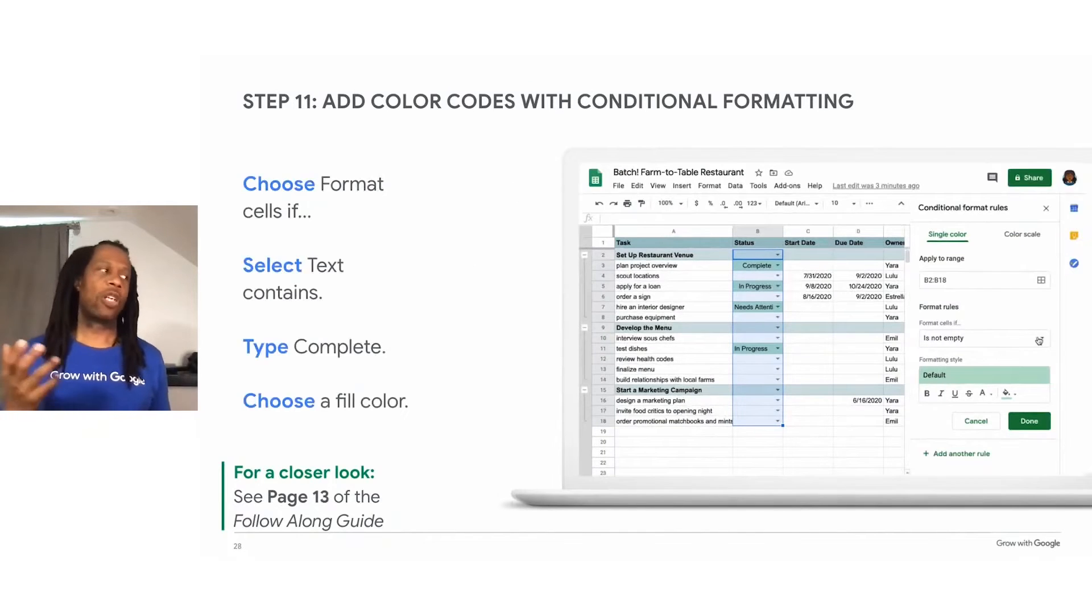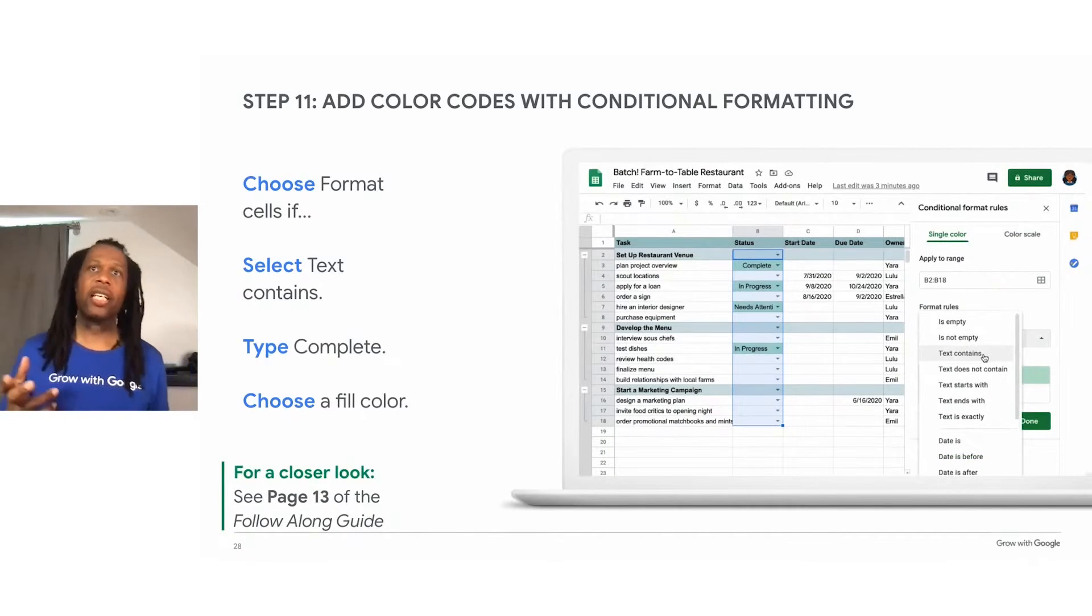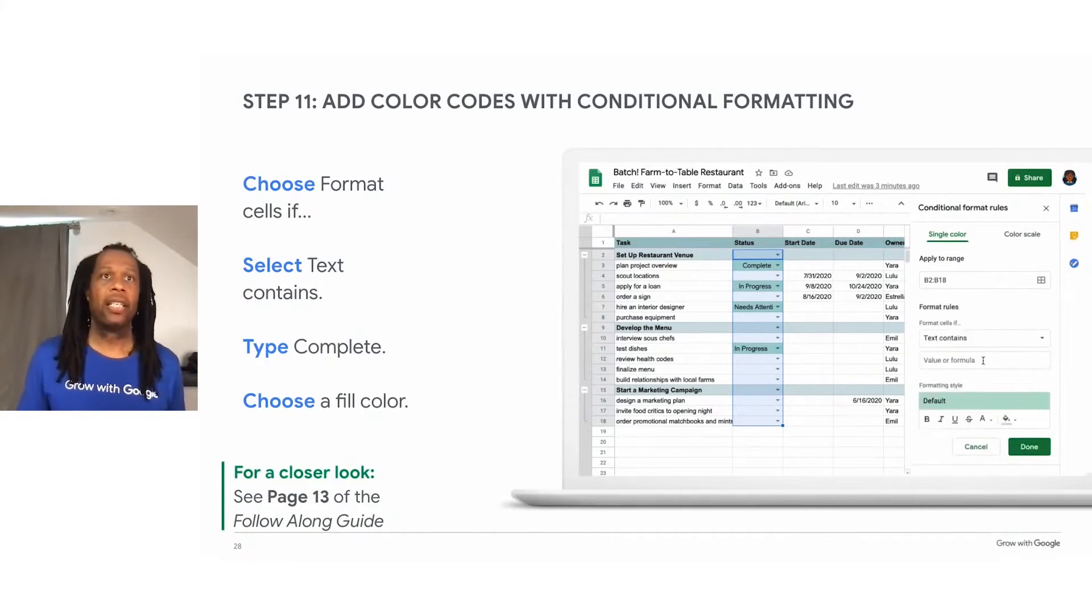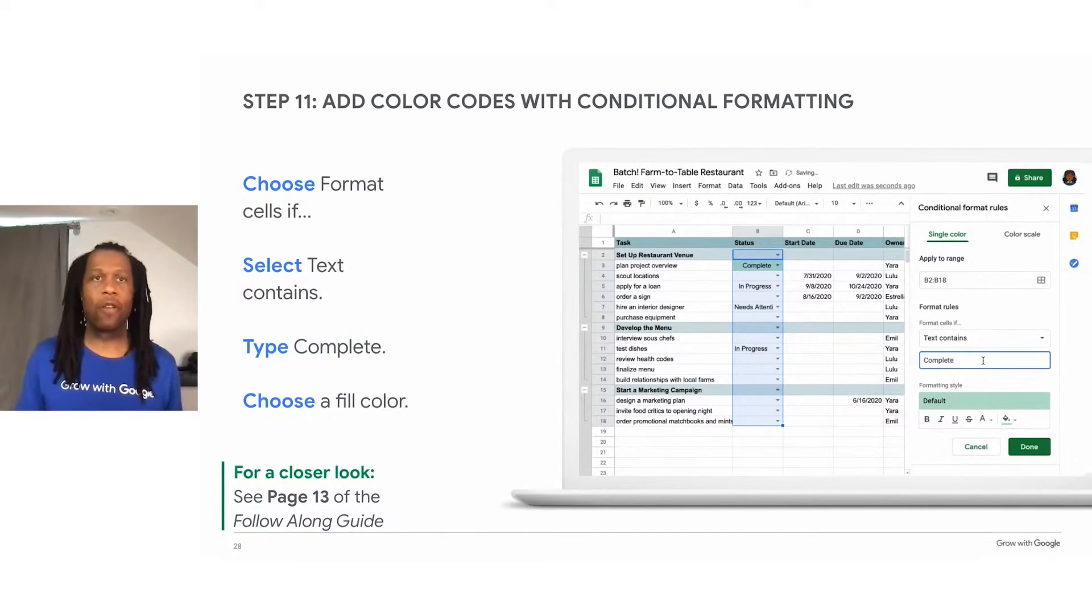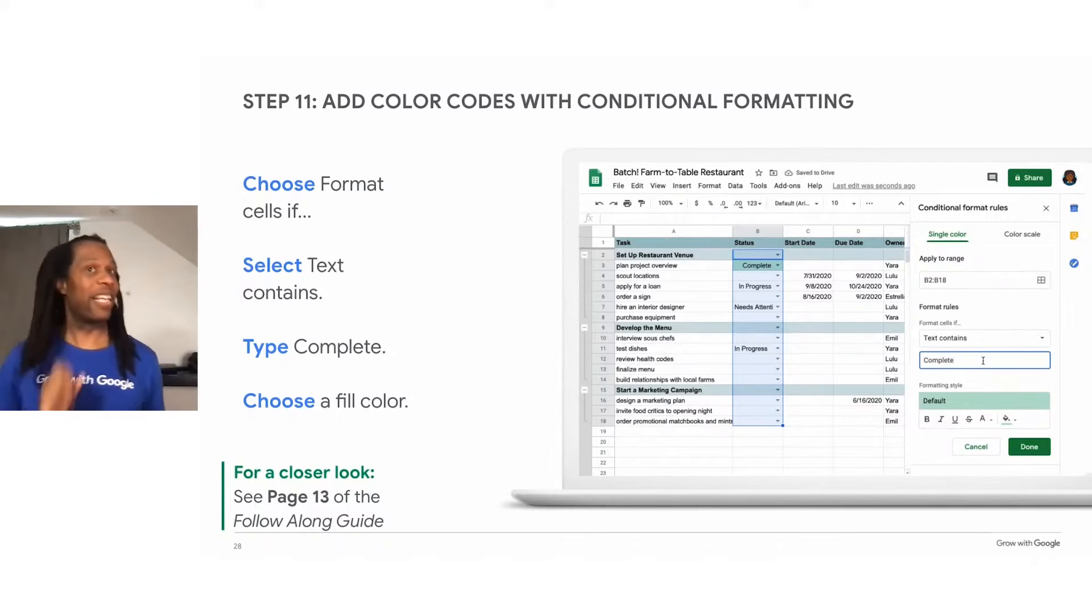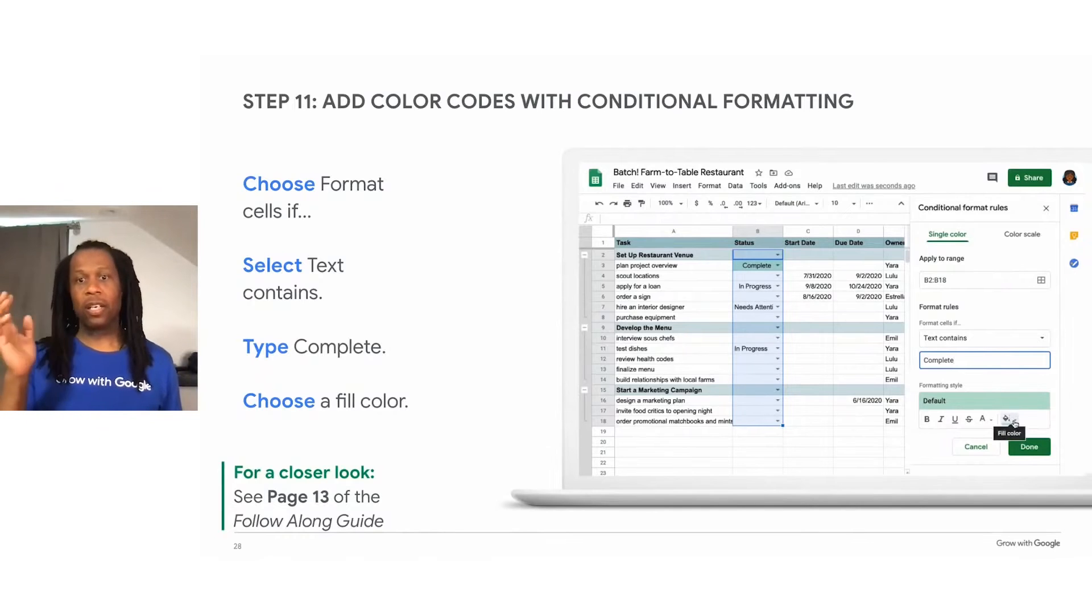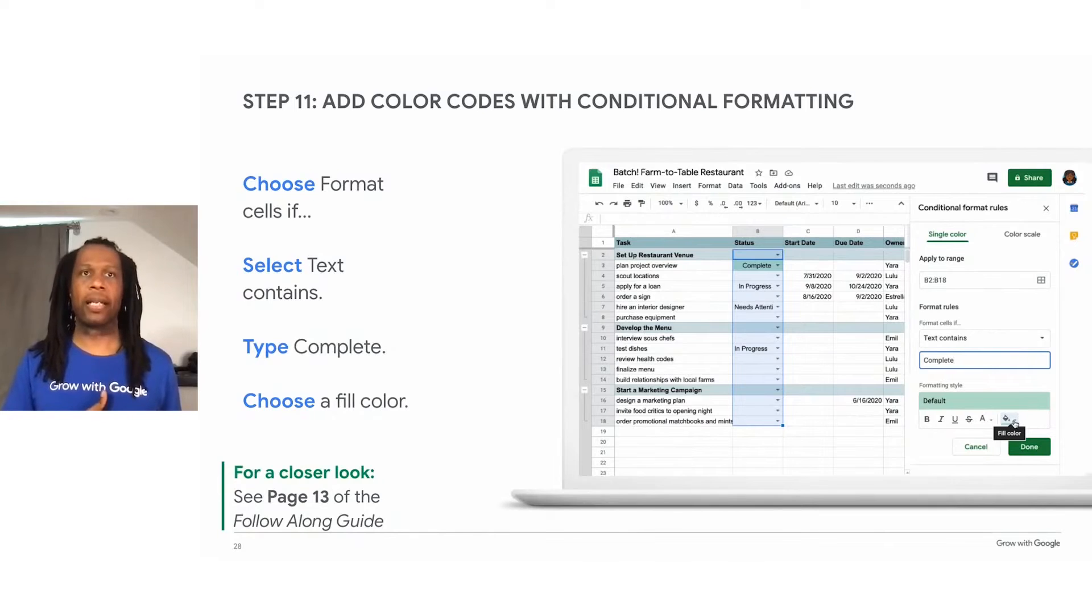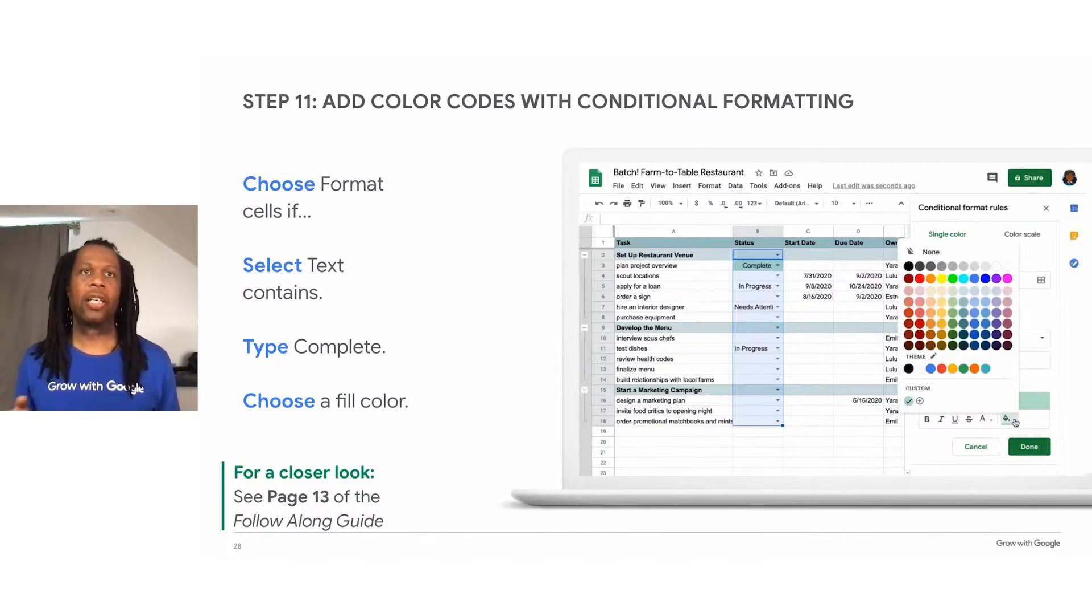Next, we want to create the if part of the statement. We want to change the format if the cell says complete. So choose text contains from the dropdown menu and then below that type complete. Now, make sure when you type in complete, you spell it right because this is probably one of the biggest issues people run into. They either type it wrong in the dropdown menu or they type it wrong in their conditional formatting. So make sure those match. And so don't put like complete and completed, you're not going to get a match.